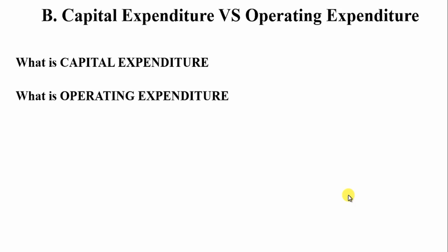So with this, I hope you have an understanding of what is meant by capital expenditure and what is meant by operating expenditure. Capital expenditure involves a huge outflow of cash at certain points of time. Understand this importantly. Based on this understanding, we look at another important concept: buying versus leasing. Whenever you buy a new asset, that is a capital expenditure. Whenever you lease an asset, a machinery or equipment, on which you just need to pay a monthly rent or monthly lease fees, that is an operating expenditure. So buying versus leasing is basically your capex versus opex.